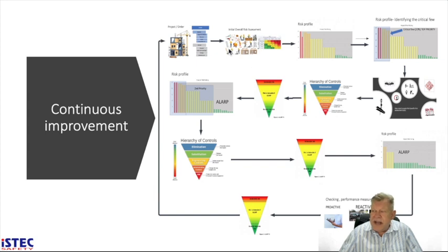We then do the initial risk assessment, and we use the risk evaluation matrix to allocate risk ratings based on the likelihood of the event happening and the severity of the consequences of the event. We can then take all of these hazards that we've named and analyzed and rated for risk.